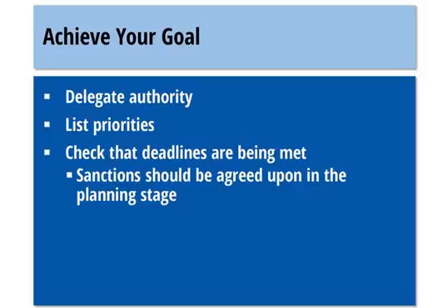Let's imagine a real estate agent gave its employees the task of creating a portfolio of 400 townhouses. Our scheduling allocates 4 months for this. After a 1 month intermediate check, you find out that there are only 50 proposals. This is no reason to introduce disciplinary measures. The key to supervising is not to criticize or accuse, but to identify shortcomings and motivate. If there is any deviation from the given schedule, remind employees that they need to adhere to it and try to look into the causes of the delay.